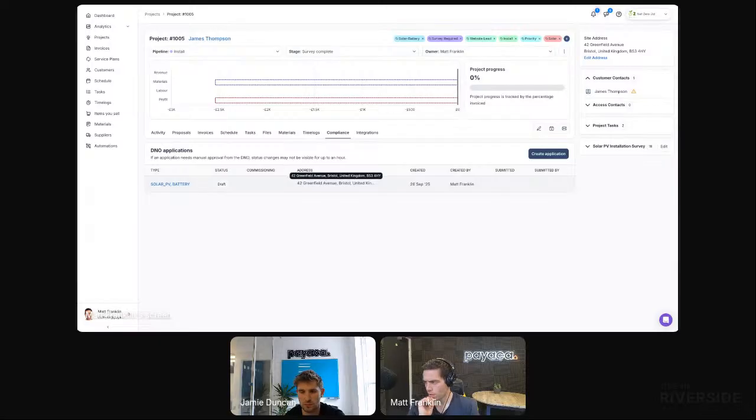We did have a question on it, so it might be worth us bringing up. Mostly those DNO applications are domestic in size. So we did check, and the applications currently through ENA Connect Direct and via Payaca, effectively the same system, although Payaca pre-populates it for you, accept applications up to 130 amps and 51 kilowatts per phase. So anything below that can be done through here. Obviously, if you're having to do it manually and separately, hopefully they catch up and we'll be able to do them all automated soon.